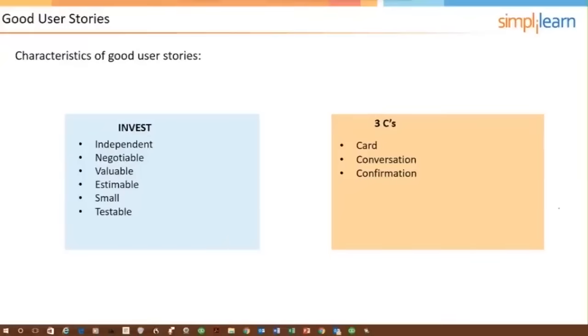Of course they'll work together if that's a necessity, but if you developed a logon screen, you could demonstrate working software for the login screen. There might be another user story that has to do with displaying the catalog and being able to flag or select items that you want to purchase. But there'd be working software for that. Would they work together? Yes, but each user story would result in some kind of working software, and they have to be independent.